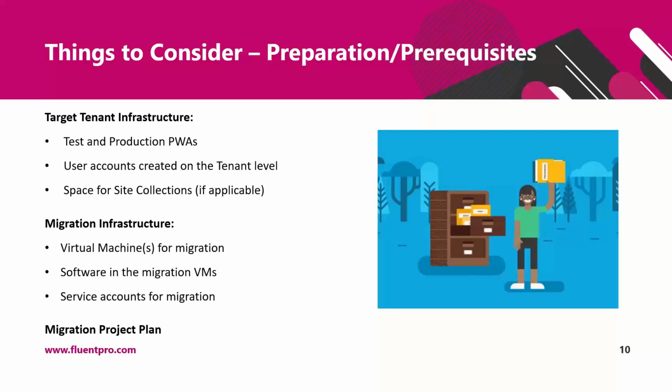And during these operations, you will not be able to work with your machine because FluentBooks will be constantly switching your focus to Project Professional. This process should not be interrupted, otherwise the download or upload that was performed will fail.